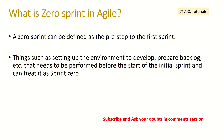What is a zero sprint in agile? A zero sprint is defined as the pre-step to the first sprint. Activities such as setting up the development environment and preparing the backlog — things that need to be done before starting the sprint — are called the initial sprint or sprint zero.